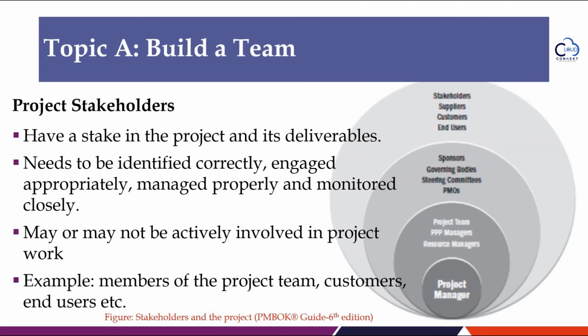Stakeholders may have competing interests, needs, priorities, and opinions. They may have conflicting visions for the project's outcomes, so managing them carefully is an important part of the project manager's role. Project managers must identify the internal and external stakeholders of a project as early as possible, learn what their needs are, and secure their participation in defining the project's parameters and success criteria. Although it may be difficult to negotiate a consensus early in the project, it is far less painful and costly than getting to the end of the project only to learn that someone's needs were not met or were misunderstood.